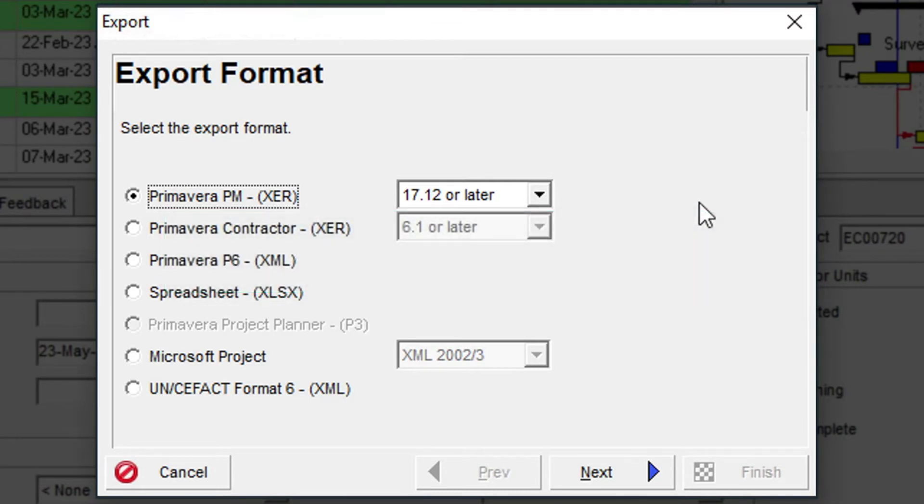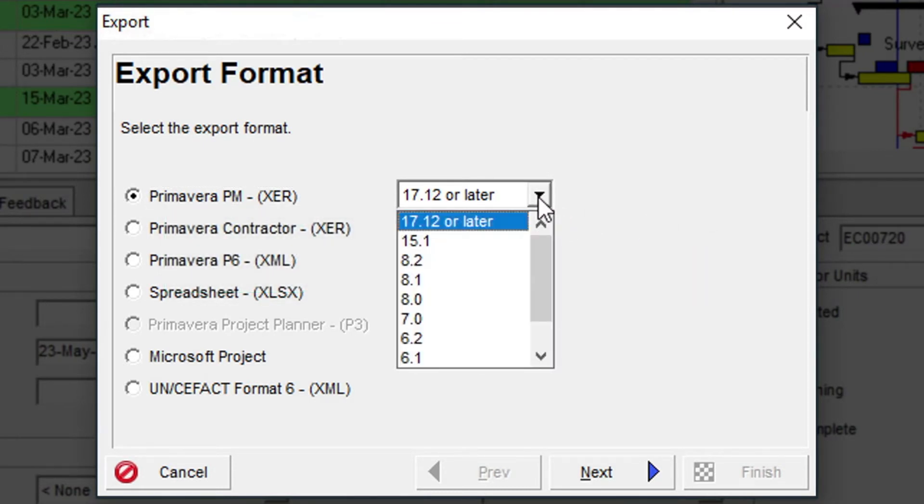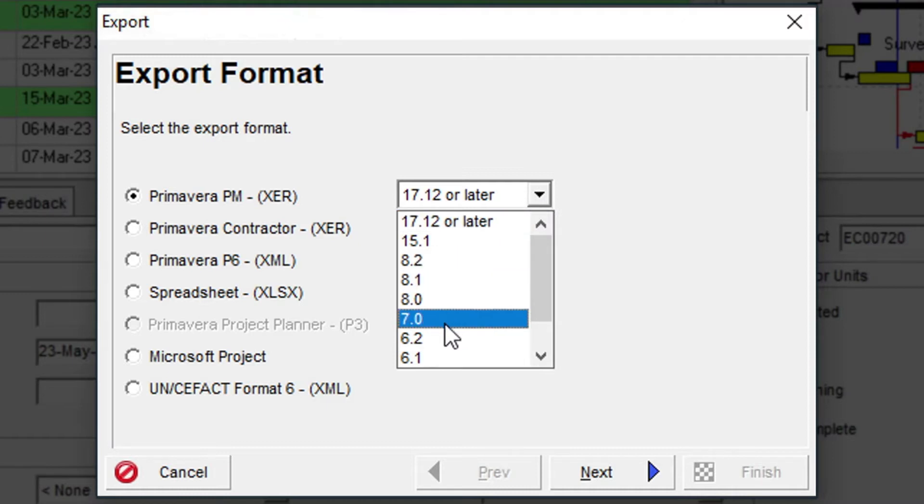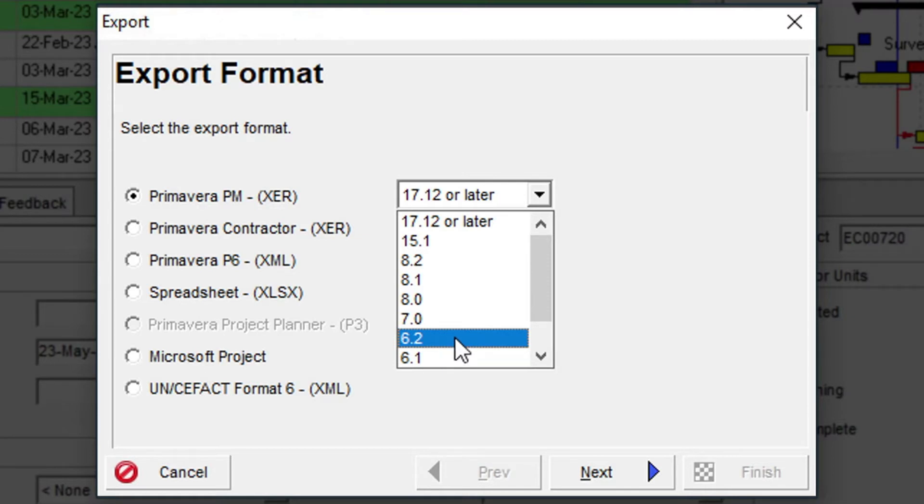The adjacent drop-down menu lists the P6 version that you can export to. It's always a good idea to export to an earlier format if you're not sure what version the target system is likely to be.